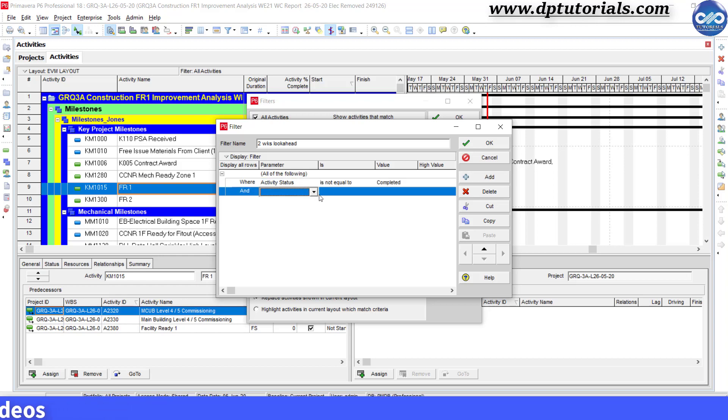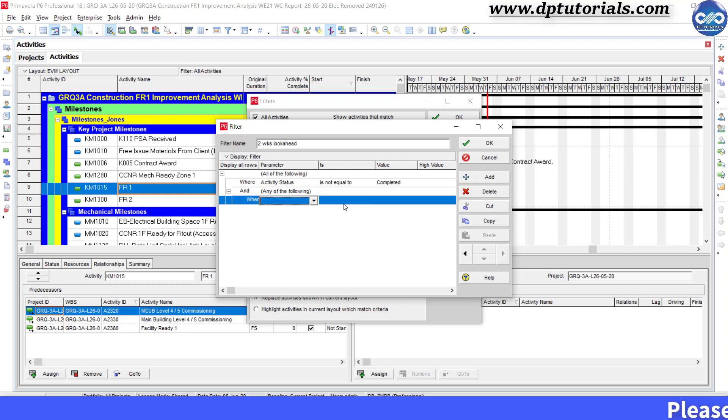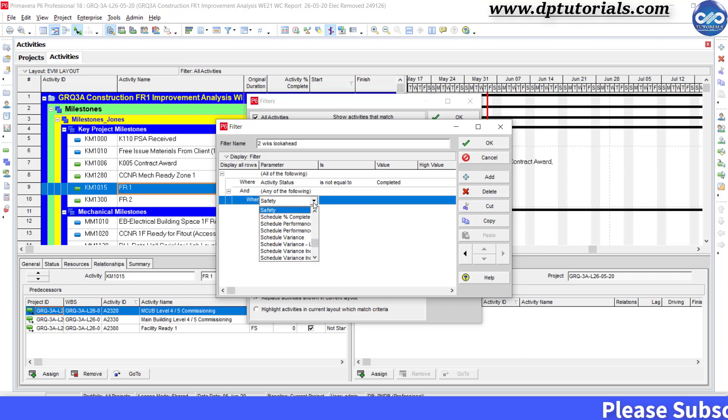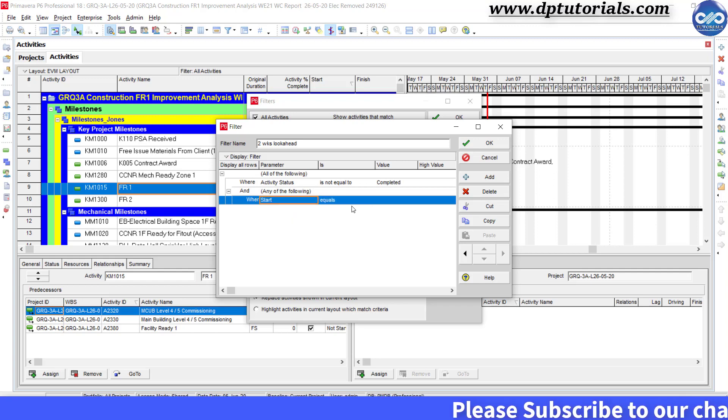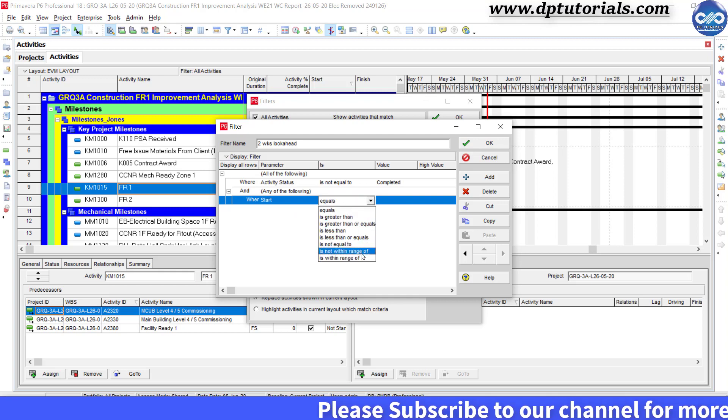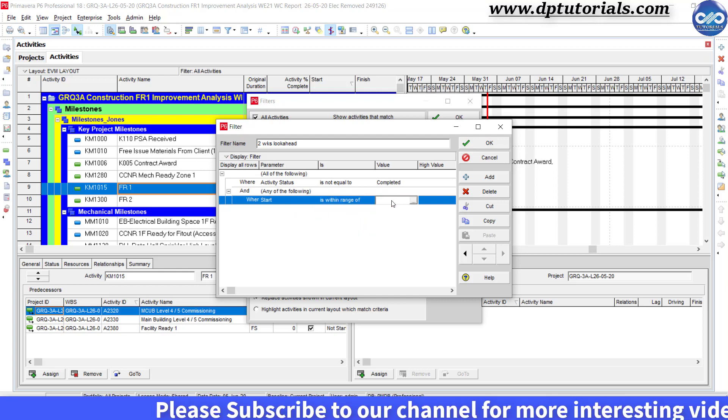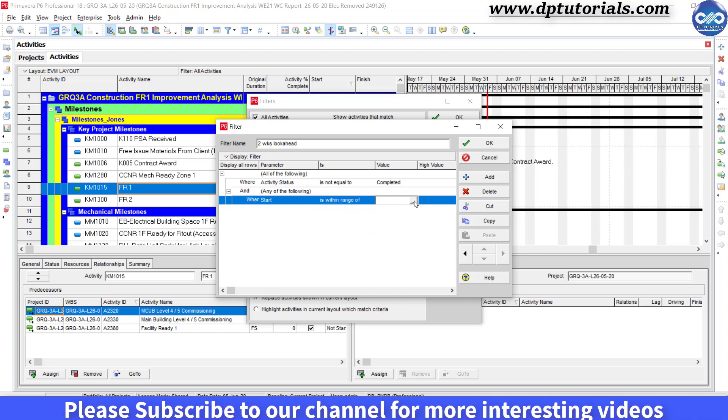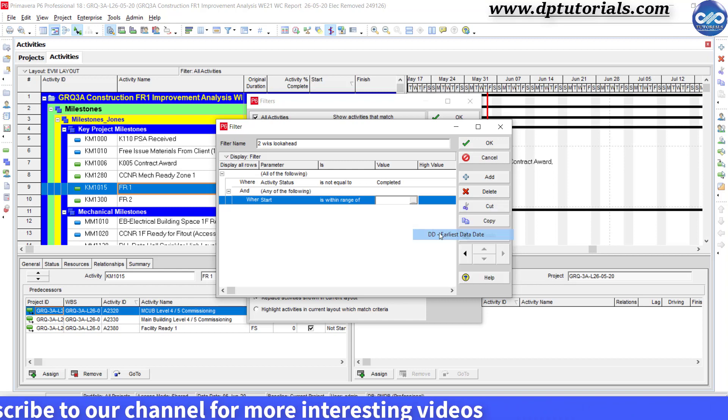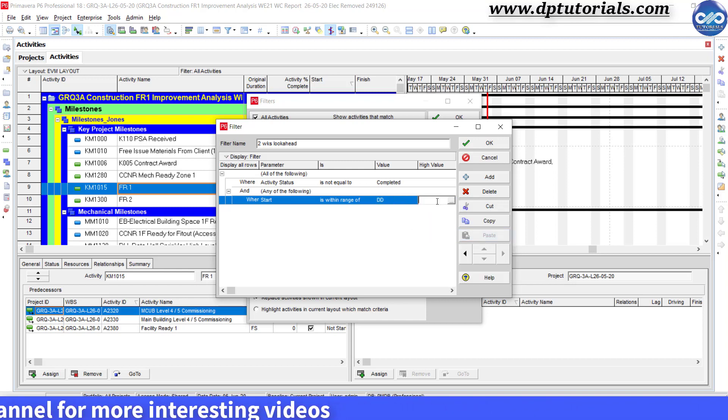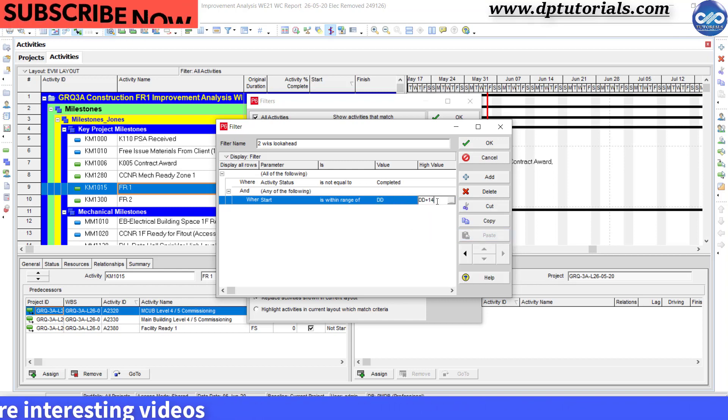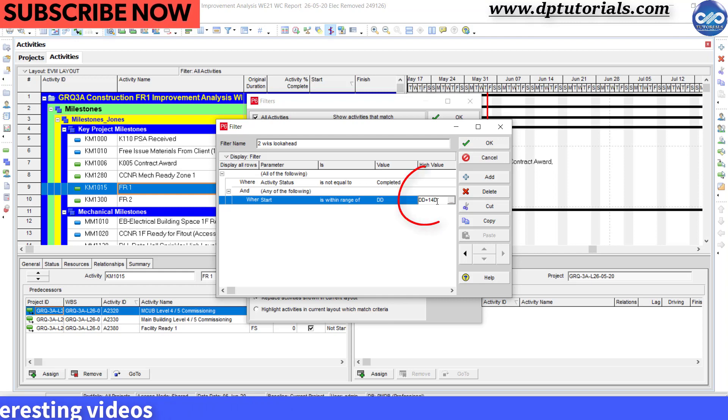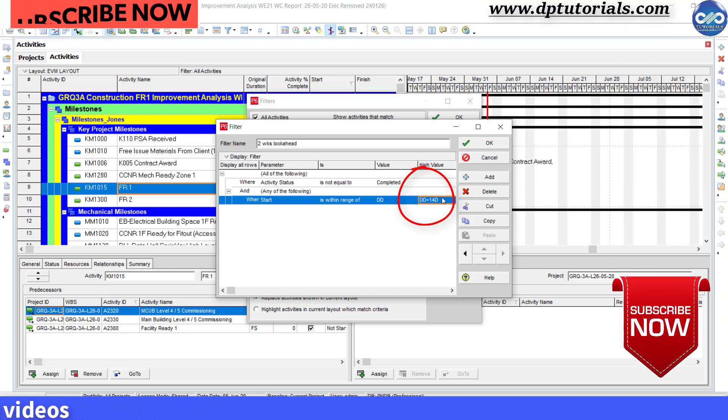Now select any of the following. Now we are giving the nested condition. Click add again and give the condition as start is within range of DD, that is data date, and high value as DD plus 14 days, that is two weeks.